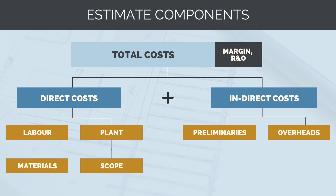Indirect costs are the opposite of direct costs. Also known as overhead or preliminary costs, indirect costs are expenses incurred by a project that cannot be directly attributed to a specific activity. Unlike direct costs, which are directly associated with a particular activity, indirect costs support the overall project and are shared across multiple activities. Examples include management staff salaries, temporary office hire, and security guards. Indirect costs can be largely grouped as either recurring — incurred continually throughout the project lifecycle — or non-recurring, where they are one-off expenses.